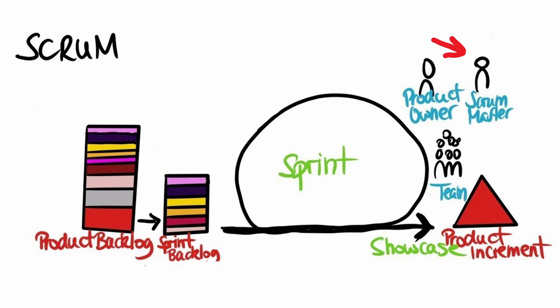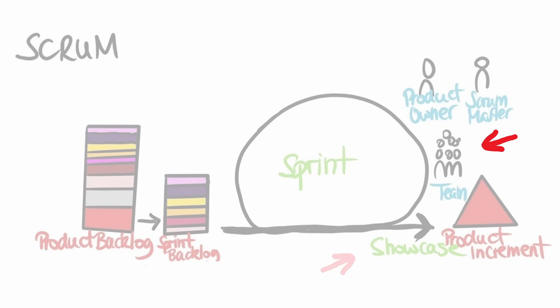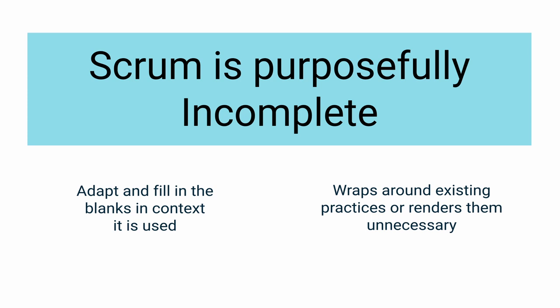In a nutshell, Scrum requires a Scrum Master to foster an environment where a product owner orders the work for a problem into a product backlog. The Scrum team then turns a selection of that work into an increment of value during a sprint. The sprint team and its stakeholders inspect the result and adjust for the next sprint. Rinse and repeat. The framework is purposefully incomplete, only defining the parts required to implement Scrum theory, so we need to adapt and fill in the blanks for the context in which we use it. Scrum wraps around existing practices or renders them unnecessary.